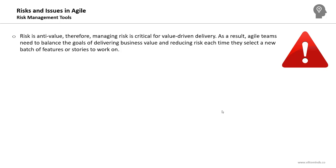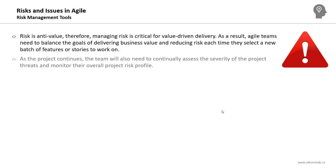Agile teams need to balance the goals of delivering business value and reducing risk each time they select a new batch of features or stories to work on. The agile team needs to balance their efforts between developing new features and executing risk response plans to mitigate the impact of the risks.